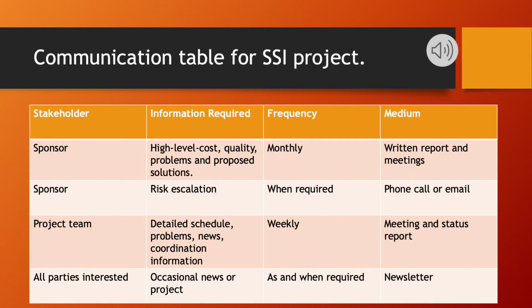This slide is the Communication Table for the Surgical Site Infection Project. The table involves each person involved with the project, such as our stakeholders, our sponsors, our project team, and all parties of interest. Which information will be required for these people is shown in column 2. Each one is a bit different. Then there is the frequency needed to contact each person. Weekly will obviously be for the project team, who will be regularly updated.